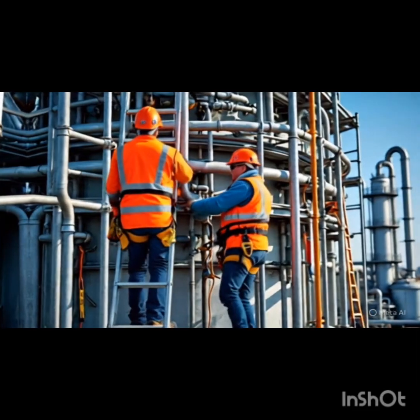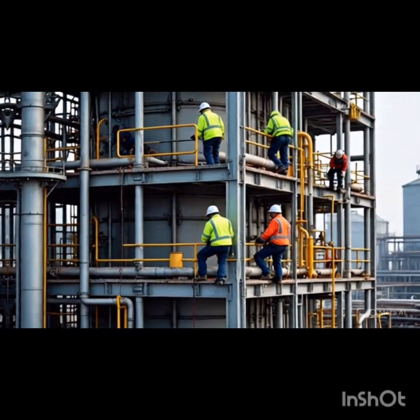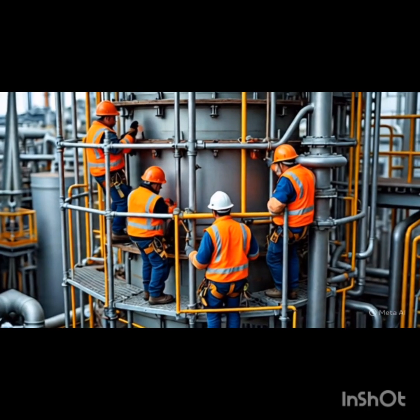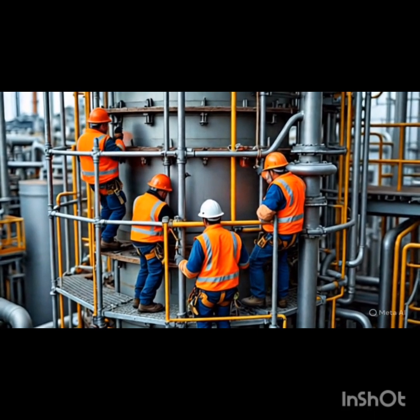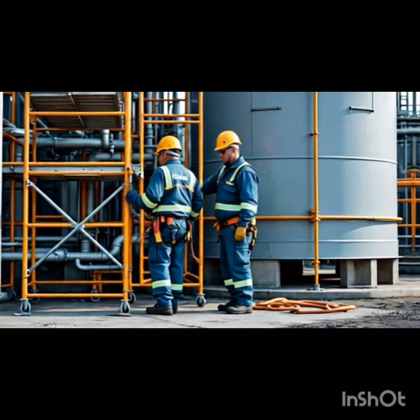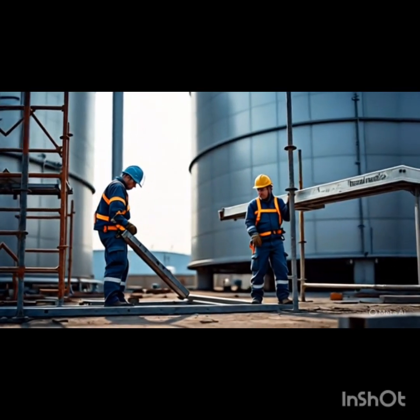The price is fixed up front. So risks like cost overruns or schedule delays, they mostly land on the contractor's shoulders. And the owner has protections. Absolutely. Contracts always include things like performance guarantees. These make sure the finished plant actually performs as promised. Maybe it's meeting a certain production output or energy efficiency target.